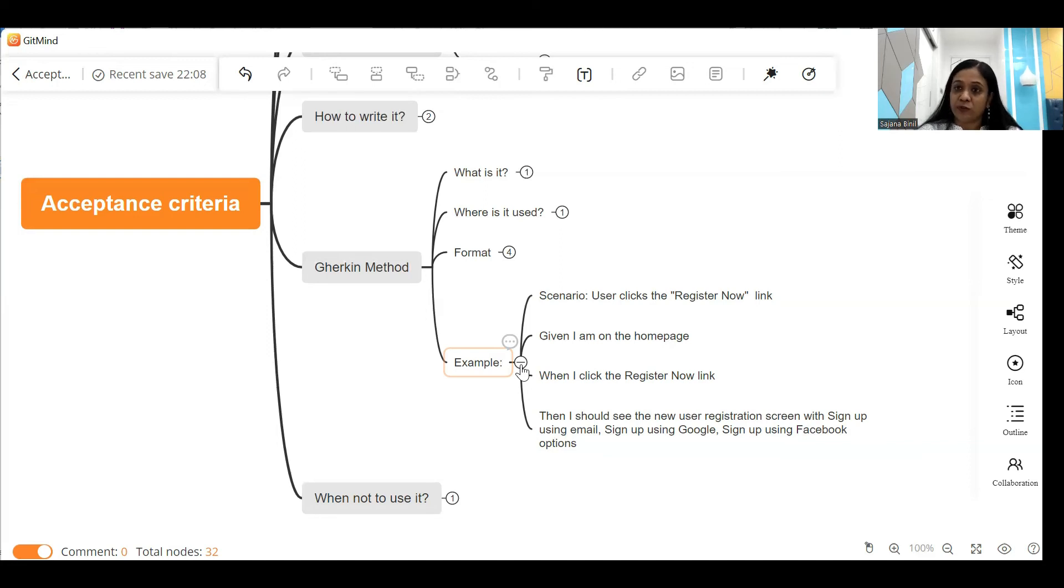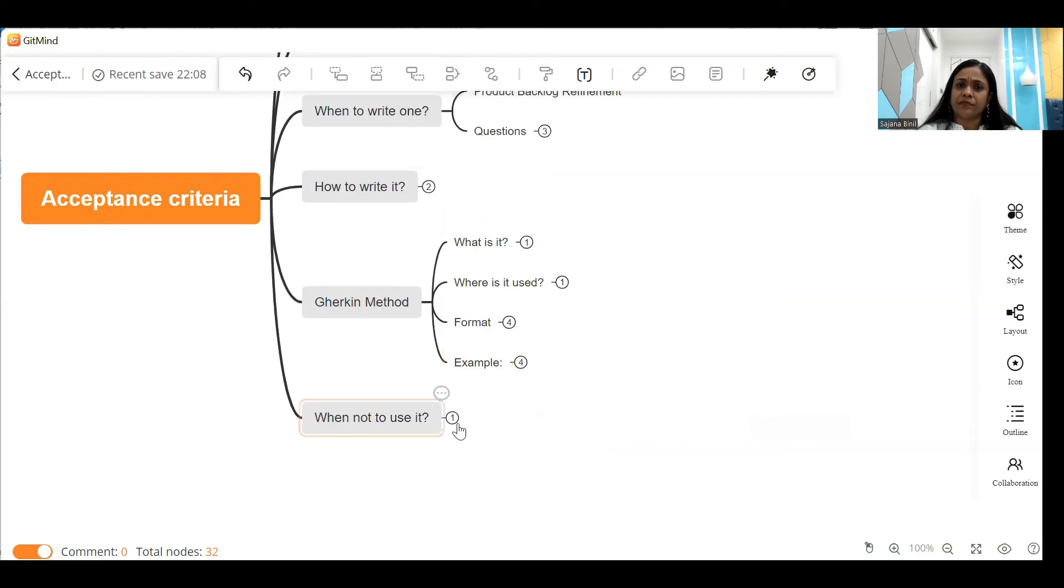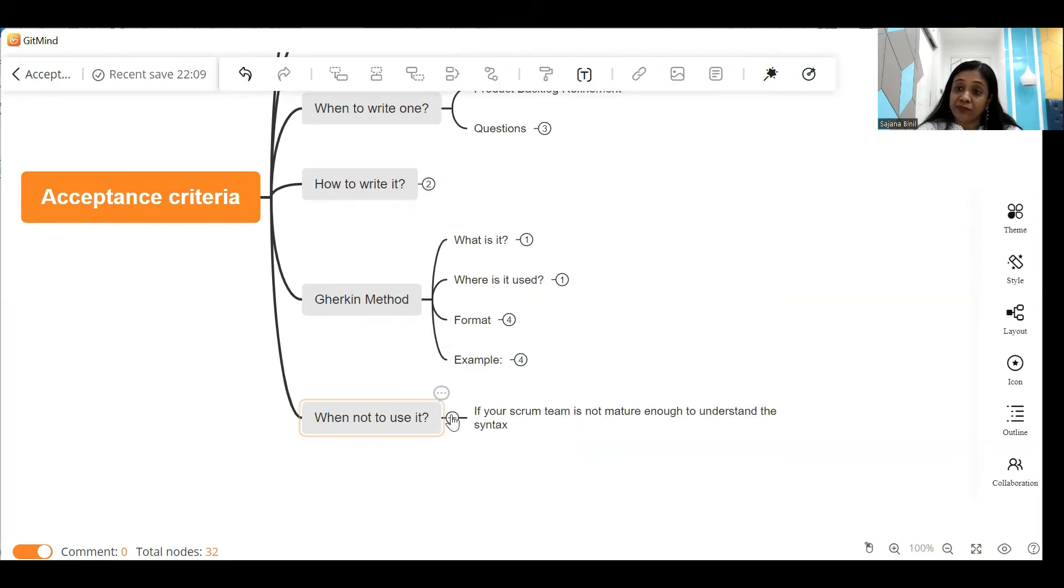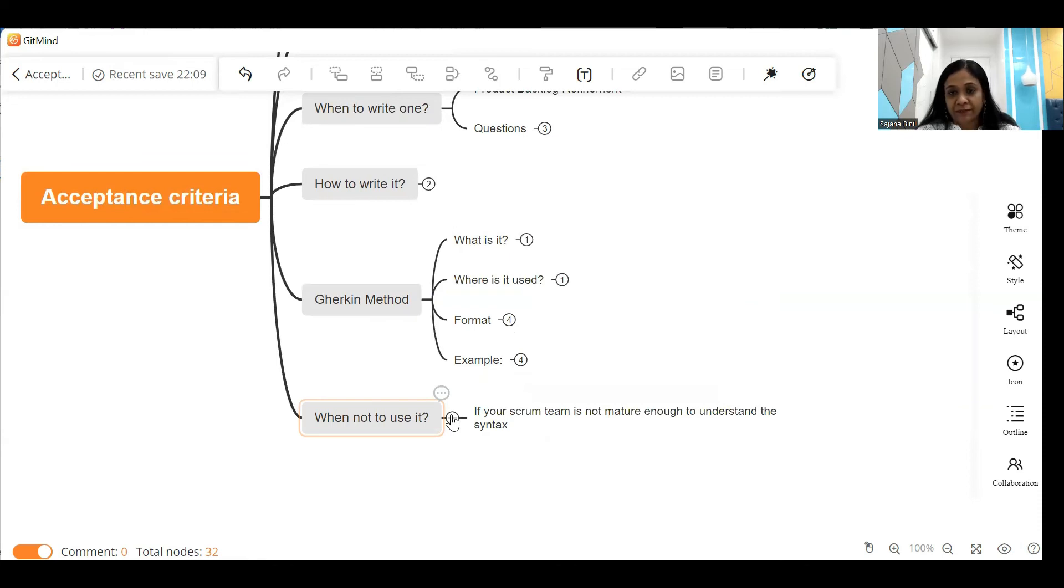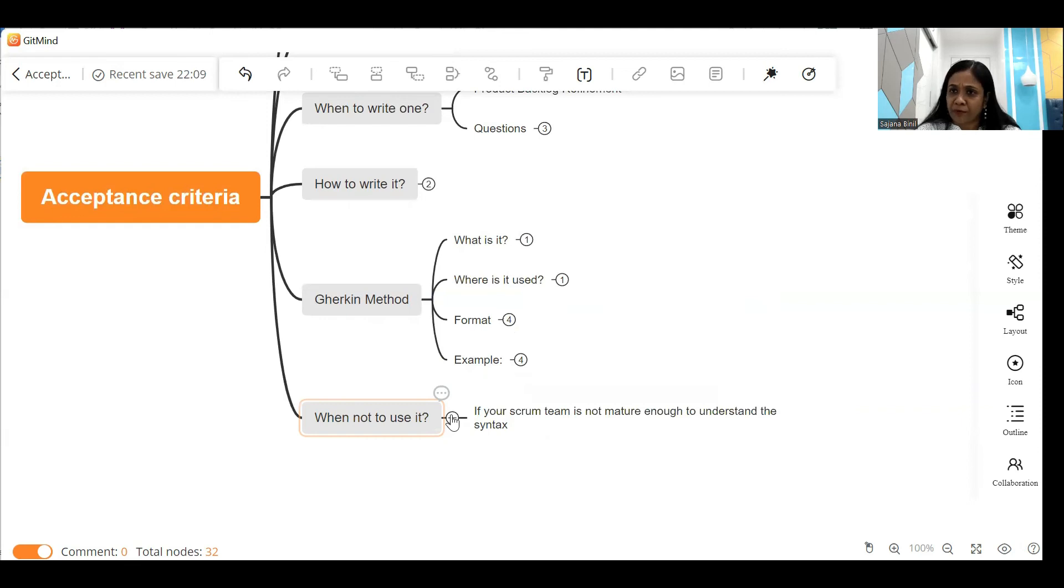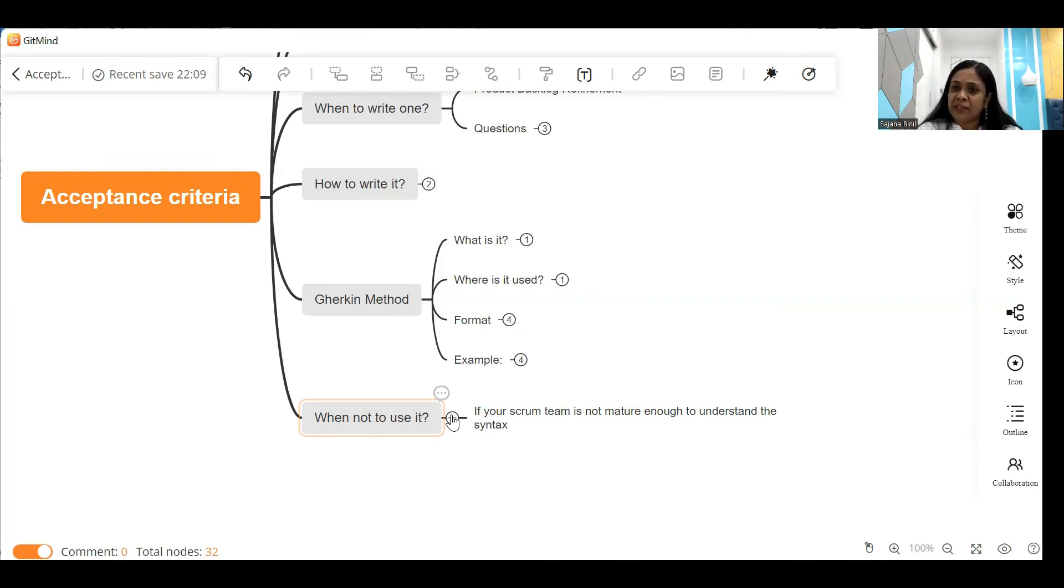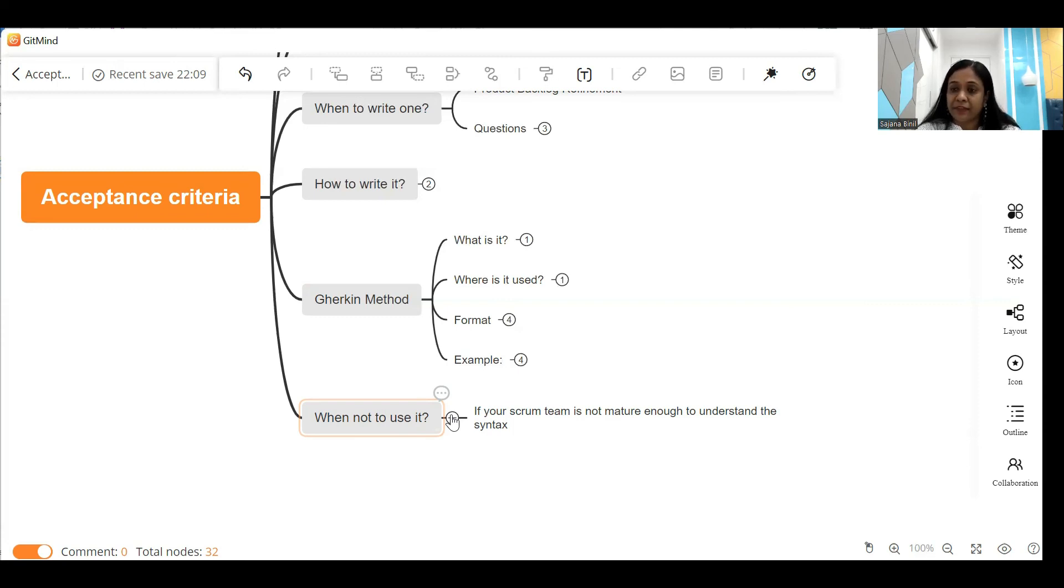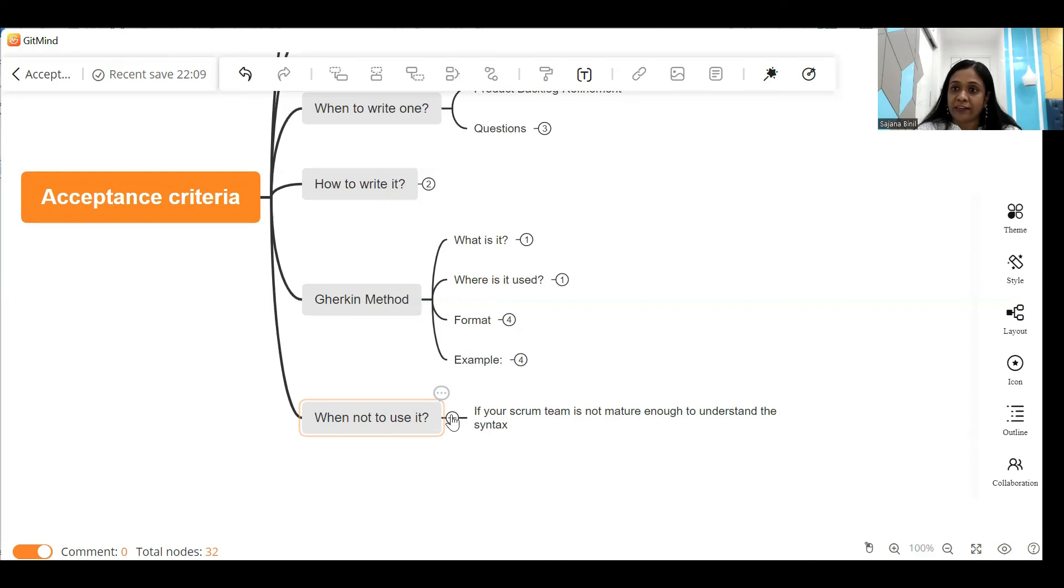Now a very common question business analysts ask is: when not to use it? Well, Gherkin as a language for acceptance criteria is widely used in agile projects, but when should you use it and when should you not use it? I would suggest if your scrum team is mature enough to understand the Gherkin syntax, then you can comfortably use it in your projects. But if your scrum team is relatively new to the scrum processes and many of the team members are not even aware of how to understand these conditions, then my suggestion is you go via the simple bulleted list format. So write acceptance criteria using the simple bulleted list format if your scrum team is not a mature team and there are a lot of beginners in the team who do not understand Gherkin.